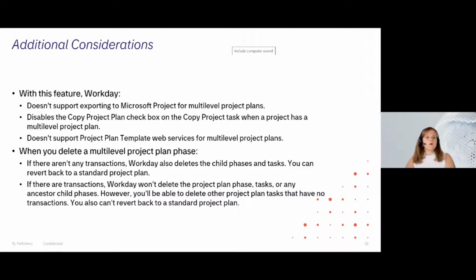Additional considerations about this feature. Export to Microsoft Project is not supported for multi-level project plans. Also, the copy project plan checkbox is disabled for multi-level project plans. And as well, the project plan template web service is not supported for multi-level project plans.